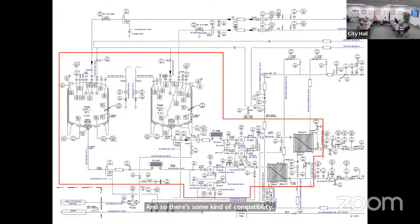One of the things I've asked in this part of the framework for this RFP is: tell me what you are using. What are your flow meters? What are your gauges? What are your valves? So that we can service those, and can we have interchangeability with some of the other systems the city's using? Some of this gets annoyingly complicated quickly, but it's an important thing. And this is why you have retained somebody like Westech to sort through all this and give you a roadmap of don't step in the cow pies here, there, and everywhere.